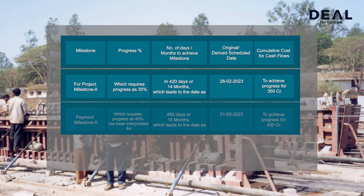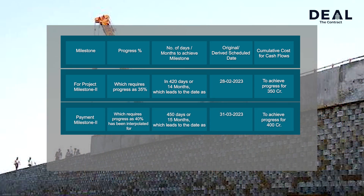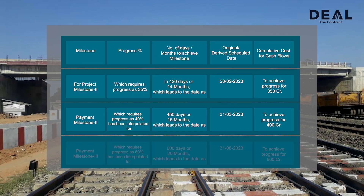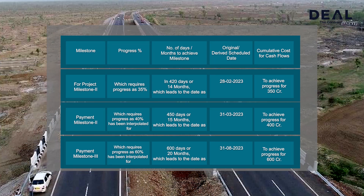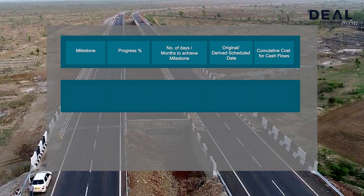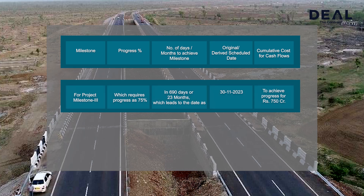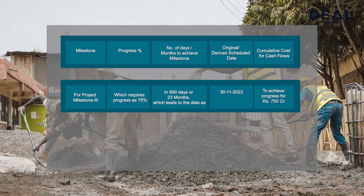Payment Milestone 2 requires 40% physical progress and has been interpolated, leading to a derived date to achieve progress worth Rs. 400 crore. Payment Milestone 3 requires 60% physical progress and has been interpolated for 600 days or 20 months, leading to a derived date to achieve progress worth Rs. 600 crore. Project Milestone 3, which requires 75% progress in 690 days or 23 months, leads to the date of 30th November 2023 to achieve progress worth Rs. 750 crore.